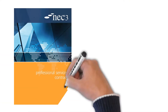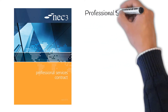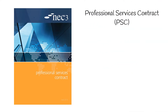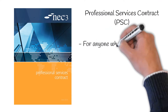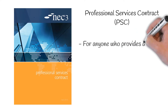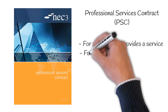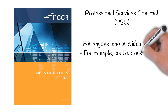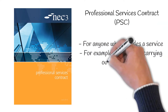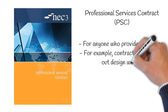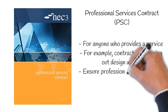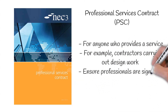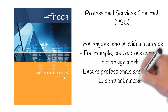Professional Services Contract, or PSC for short. This is to be used for anyone who provides a service, for example contractors who carry out design work. This ensures that although the design is produced for a contractor or an employer, they would also be signed up to follow the clauses within the contract.